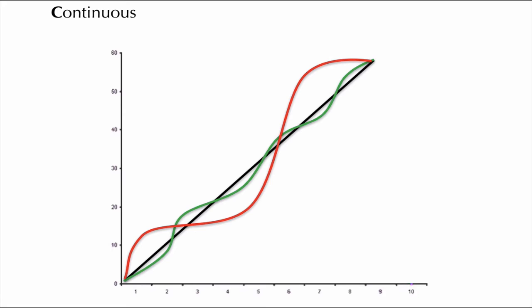Which is better, the red curve or the green curve? Well, if the green curve is possible, this part of the red curve must represent some kind of waste, which the lean guys call muda. It might be inevitable waste, perhaps caused by a dependency on an upstream team or an influenza virus. And this part of the curve, which lean calls muri, represents overburden. We know it's overburden because the team wasn't able to maintain its velocity and fell back to the black line. Typically overburden and waste occur in cycles, like a drunk staggering from step to step. Lean calls this mura, which means irregularity or wobble.